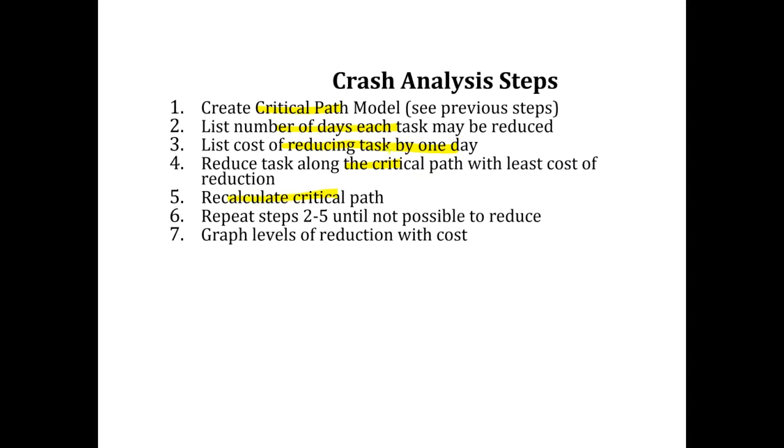And this process is done again and again, because after each crash by 1 day, your critical path could potentially change. So that's why we do not do more than one day crashing in one step.